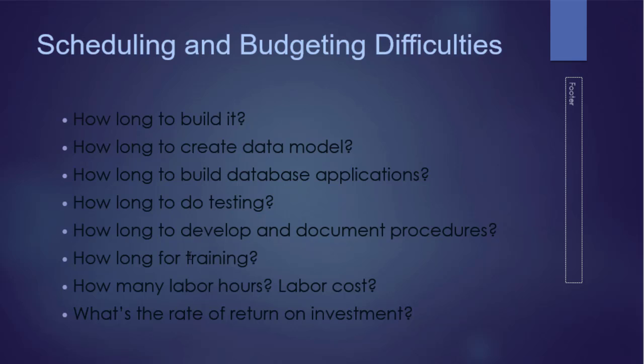You also need to think about training for your employees, whoever's going to use the system, and how much that is going to cost, your labor hours, labor costs, and so on. And so lastly, the bottom line is, what's the rate of return on this investment? If you cannot estimate how much the system's going to cost, then how are you going to be able to do any kind of financial analysis to see if it generates an appropriate rate of return? Otherwise, you'd be better off investing your money or doing some other type of system. And so that's how systems are picked, if you will.